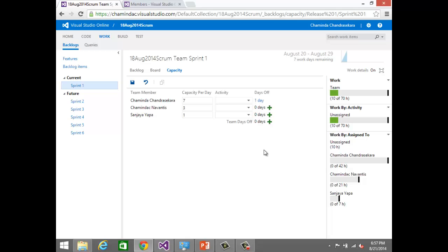No, I mean, if the deadline comes for it, yes, then those things happen. But that is again because your estimations are wrong. Because you have underestimated the task or you have underestimated the developers. It can be both ways. Maybe you have underestimated the task, because you think it's 6 hours, but it might take 12 hours to complete. So all those things will be visible once you progress like this, right? Now you understand the capacity clearly, right?